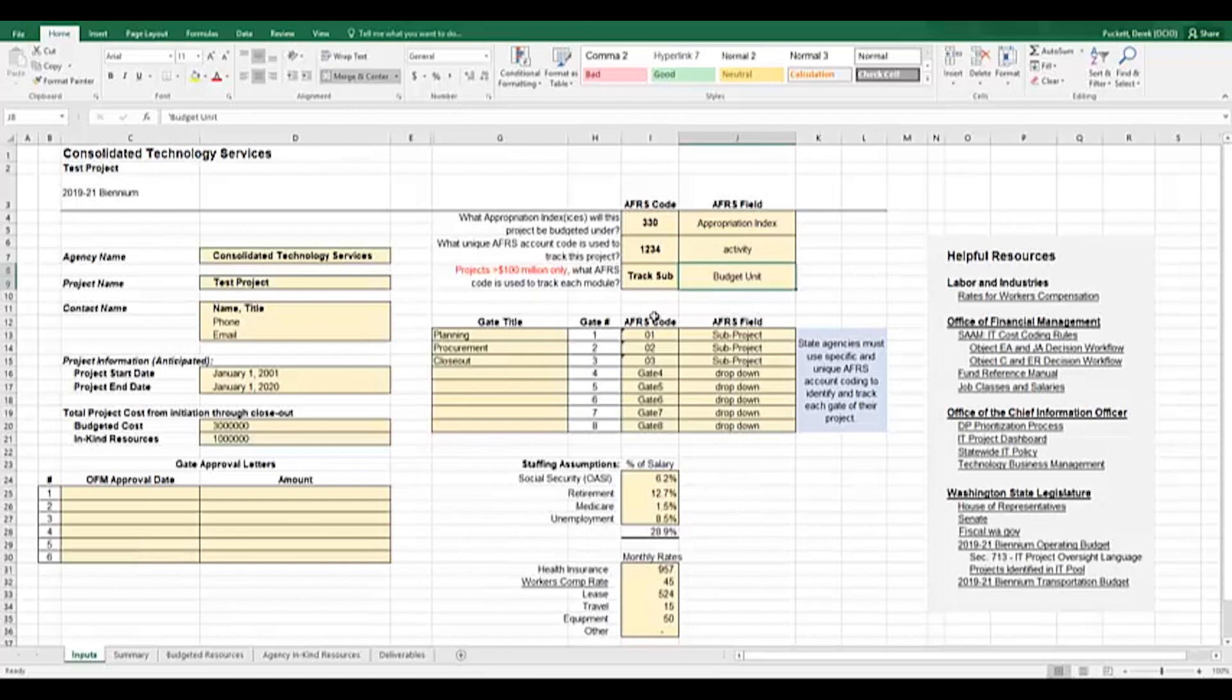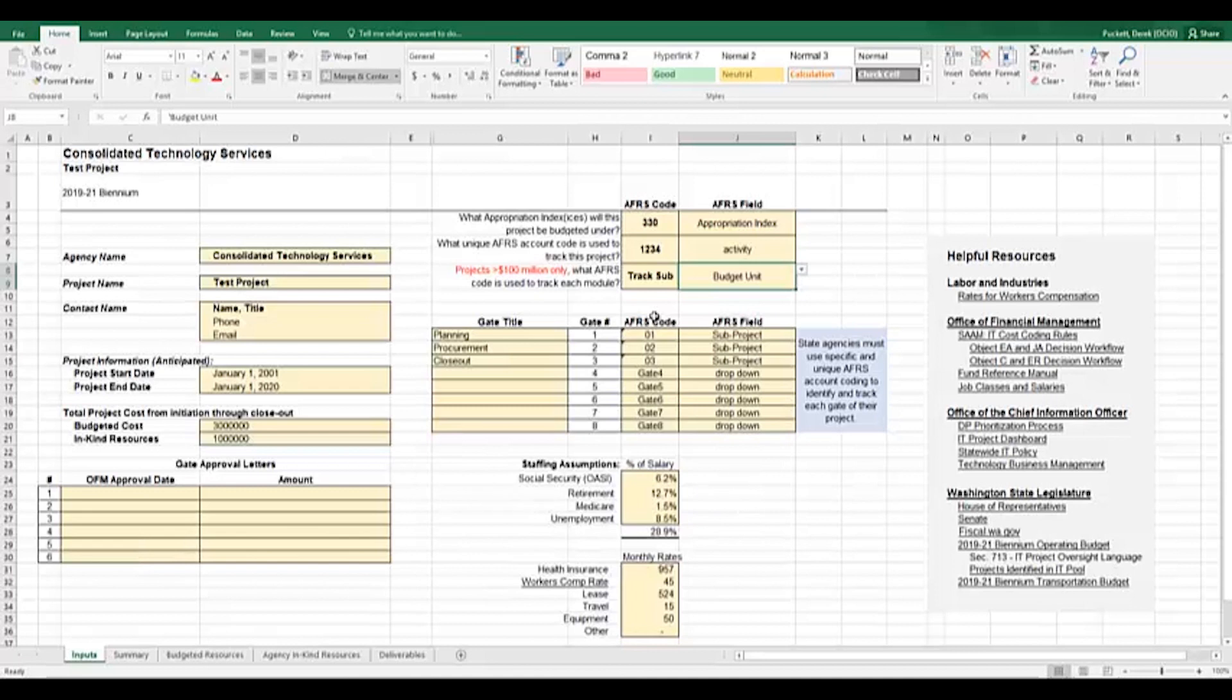If your project is over $100 million from start to finish, the next item is for you. The budget bill requires projects over $100 million to be broken into subprojects with each subproject tracked separately. Contact the OCIO for assistance on splitting your project into subprojects and filling out this form if you have a project that meets these requirements. Additionally, the budget bill requires funding to be made available in discrete stages of the project instead of all of the funding being available at one time.